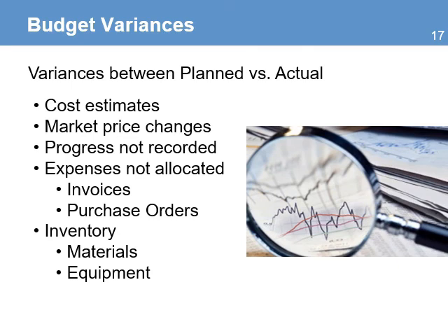Here are some of the causes for the variances between planned value and actual value. All project costs are based on estimates. The variance can occur when the estimates are done in a hurry and don't reflect the real cost in the market. Another reason is changes in the market prices, especially in unstable economies and when there's a significant delay in implementing the project. Another reason could be that progress is not properly reported. Earned value is calculated by the value the team reports on the progress they are making. If the team is not reporting this information accurately, then that can have an impact on the analysis.